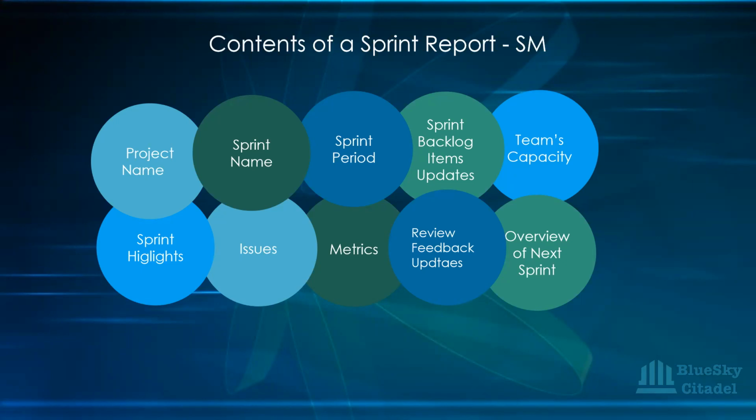And then they'll be able to see that information. Also, it's good to put, this is not cast in stone. Okay, so not every sprint report will have this. We're just saying the basic things that you might find in a sprint report. You're also able to put your team's capacity, especially if you're not able to complete any of your stories because of capacity. If you put your team's capacity there, your audience or the person reading the report is able to relate to it. We'll see how it is when we look at the story.